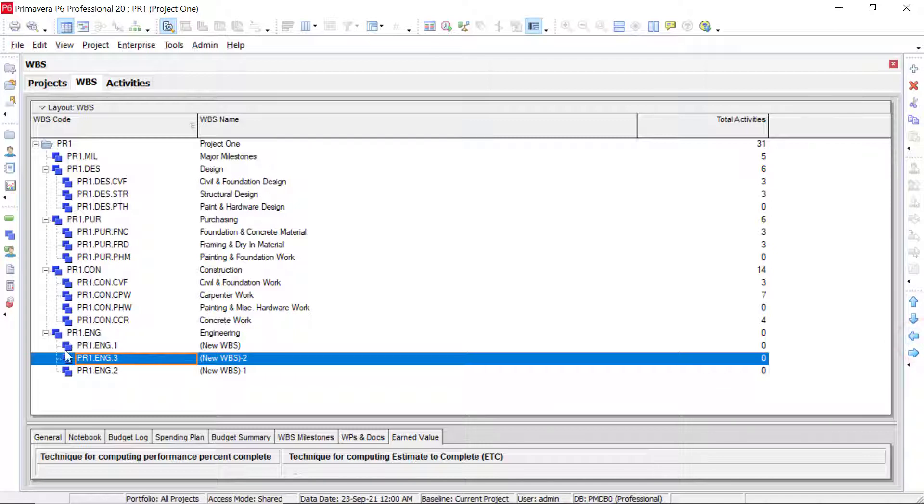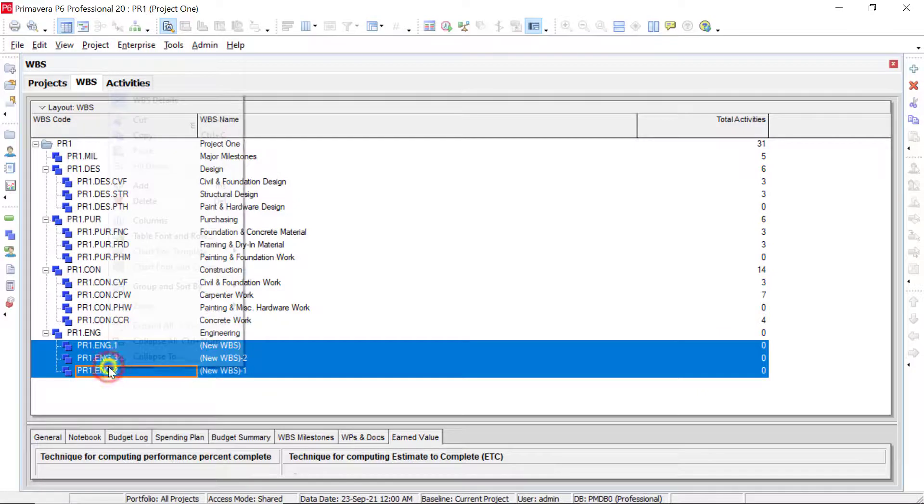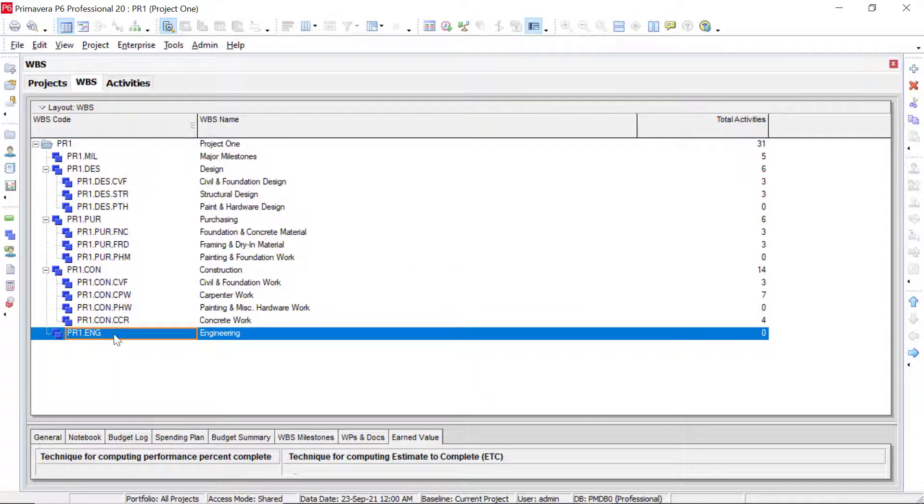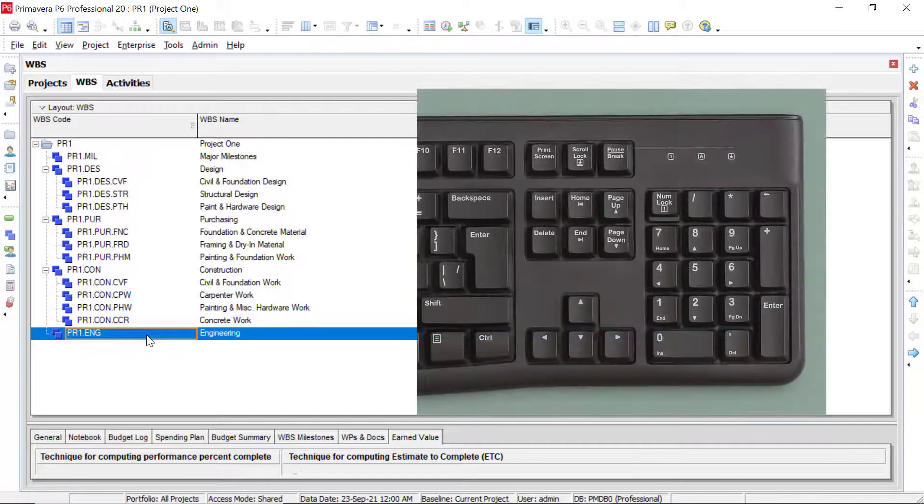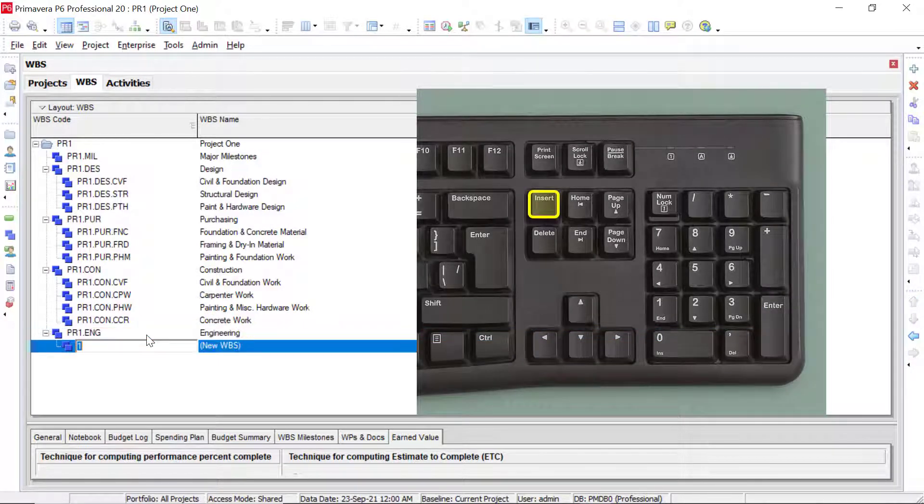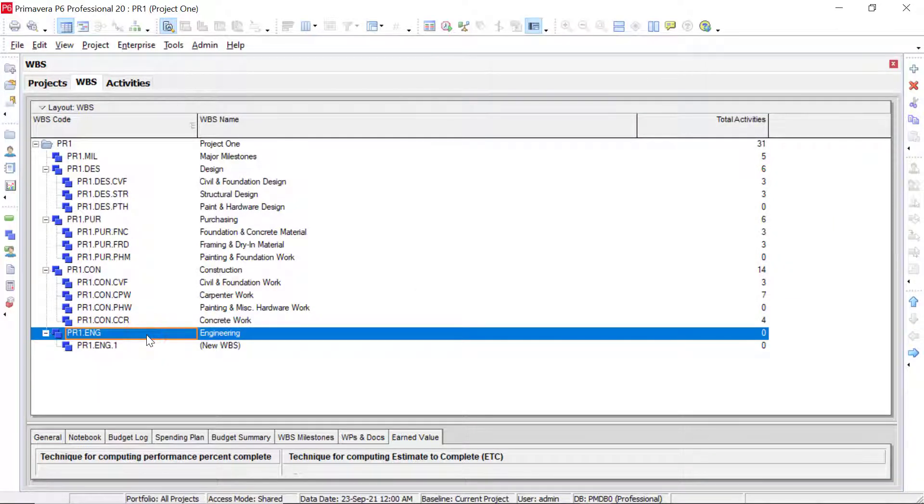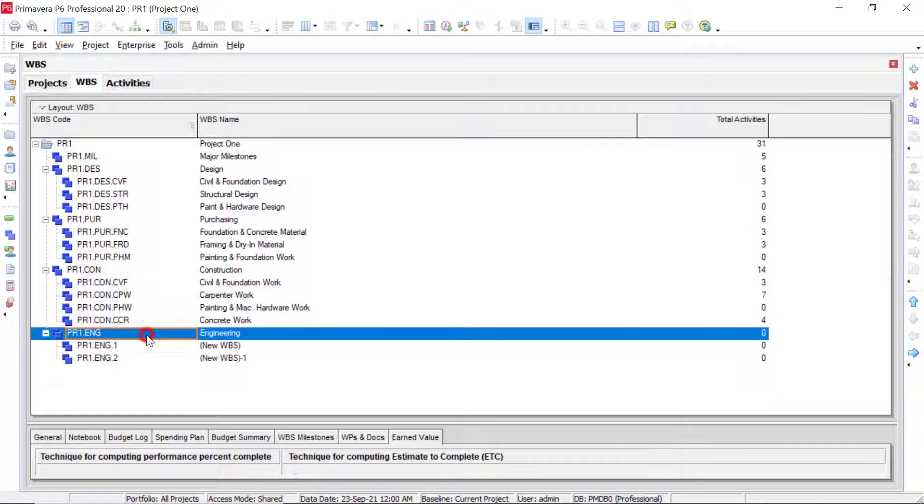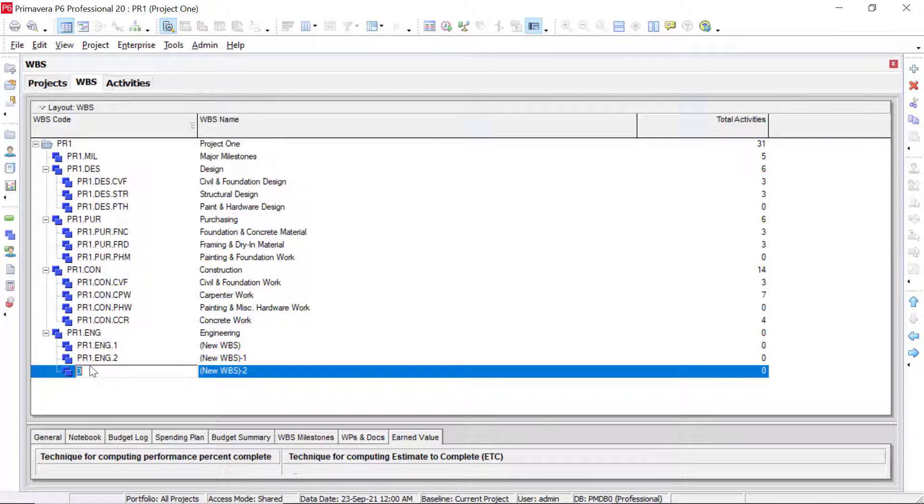And so now we see that we have all of these under engineering as level three. I'm going to delete these out because there's another way to do it. So what we could do here that makes it a little bit quicker without having to use those arrow keys to move it over is we are selected on engineering. And I'm going to keep my mouse hovered right over that. I'm going to click the insert button on my keyboard. My mouse is still selected over engineering. So I'm going to click it again and then insert. And so now I've added in three elements underneath that that are all at that third level that we want it to be without having to use the arrow keys to shift it over.